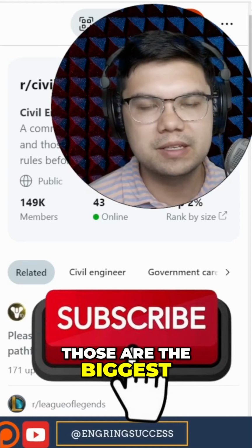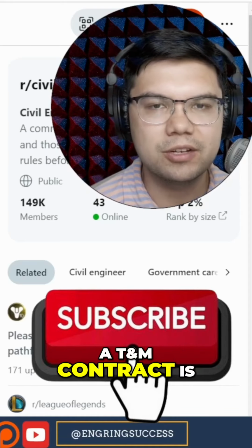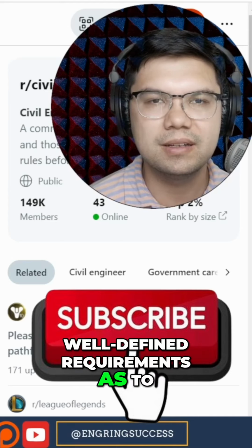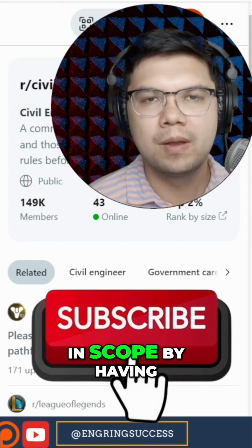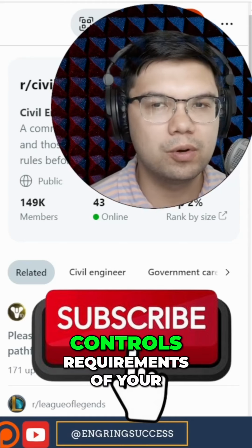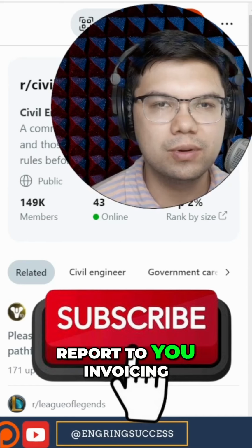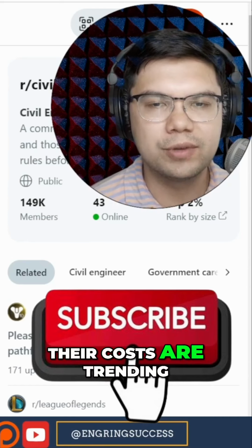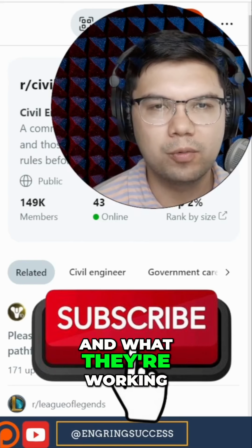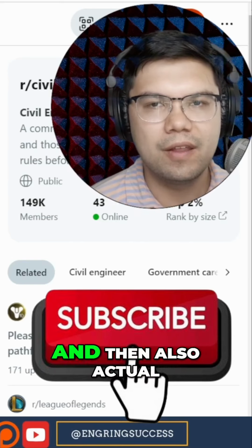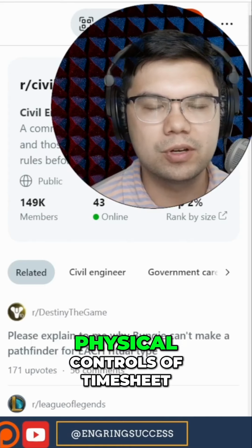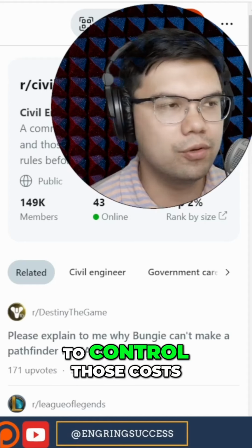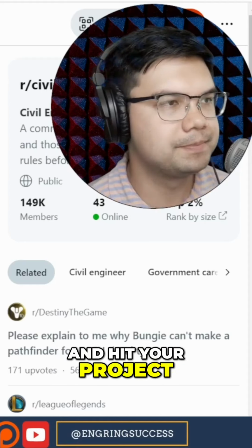So those are the biggest ways that you, as a client, can manage a T&M contract: having a contract that has well-defined scopes and well-defined requirements as to who can authorize changes in scope; having robust project controls requirements of your contractors for them to report to you; and invoicing frequently enough so you understand where their costs are trending and what they're working on and building up those costs. And then also actual physical controls of timesheet data and batch tickets and material receipt tickets to control those costs as they come in and hit your project.